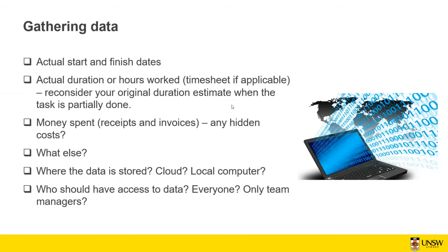So what else do you think that you need to gather during the project execution? We discussed the actual start and finish date, duration, the hours worked, the money spent. So what else? Yeah, the type of activities. For example, some of the tasks haven't yet been started, the resources, the performance that we've done.